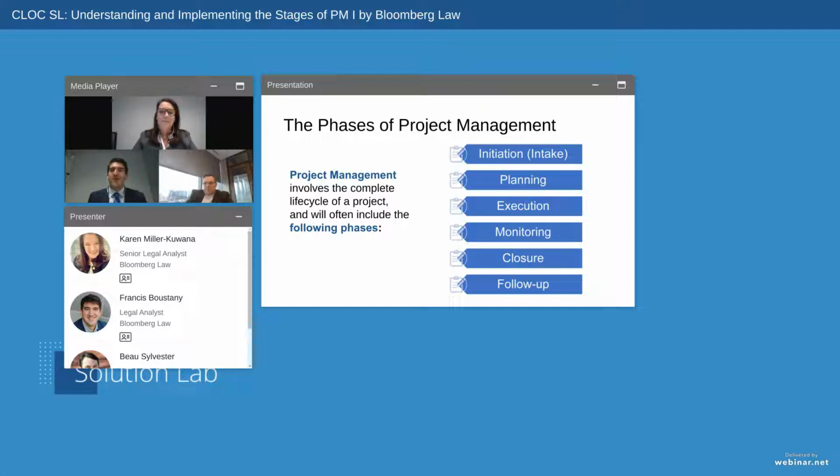In the monitoring phase, the project team normally observes the progress of the project and, based on that progress, they'll determine if they need to take any more steps, have any additional training activities, or things like that. And after monitoring, normally comes project closure. That's where the project team performs due diligence activities, such as getting project sign-off, disbanding the project team, and transitioning roles to permanent members of the team.